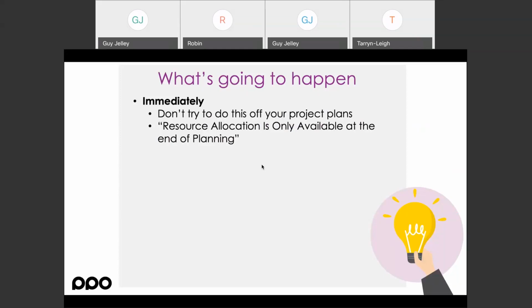And over time, you can see how different the two data sets are and where there's some commonality or alignment. The other big problem is project managers are very good at telling you that they don't know what the resource allocation is because they're still planning, and they'll only have a baseline schedule at the end of planning. That's problematic because it's typically those golden resources that are involved in helping you do business cases, initiation, and significant planning sessions. Because that's now unknown according to the project managers, you end up having these big black holes where these people disappear into, but they bottleneck resources because they're not available to do other things.